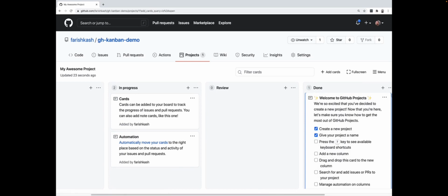We have our initial tasks, our to-dos, our in progress, what are actively being worked on, our items that need to be reviewed, and after that, those items that don't need any further changes are done. This Kanban board, as it fills out, allows everybody on the team to see what stage each task is in and what has been completed, what is in progress, and what is in need of review.